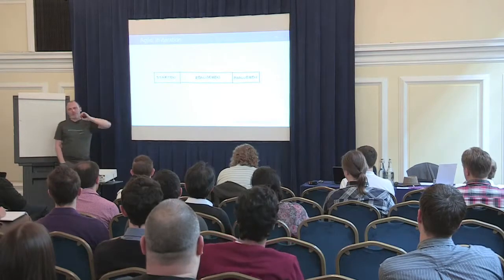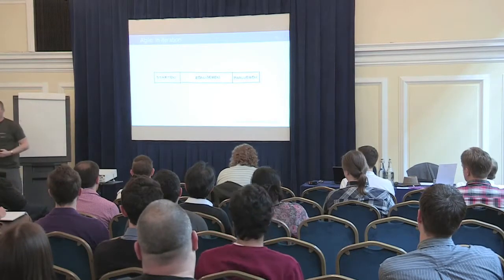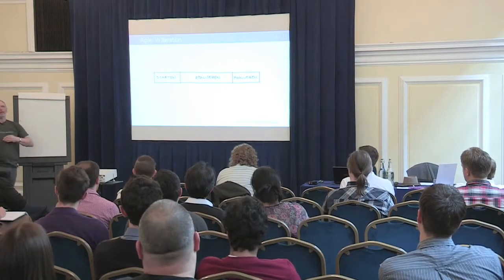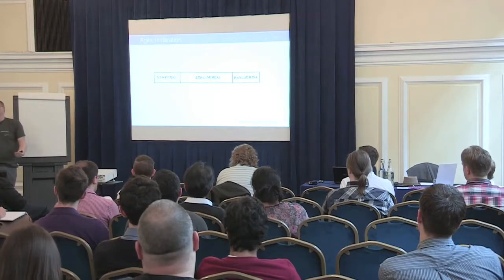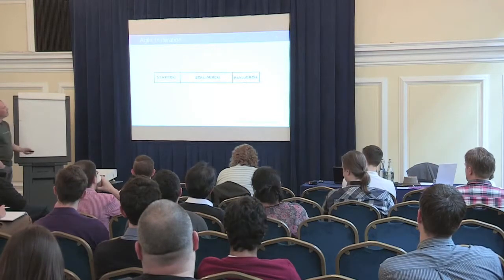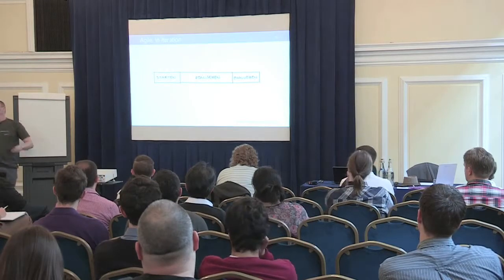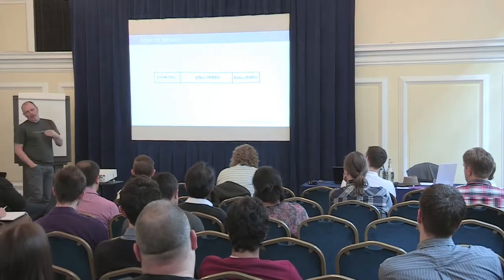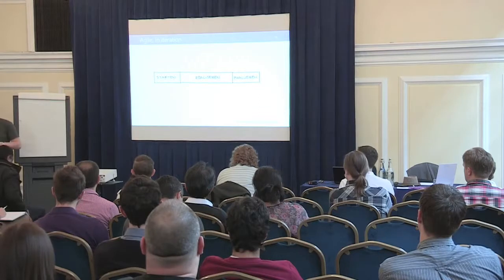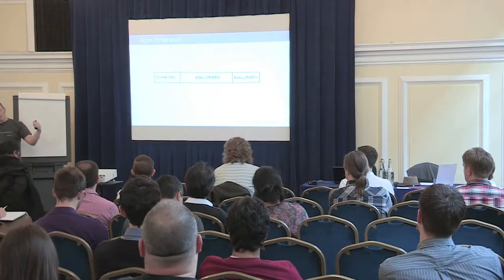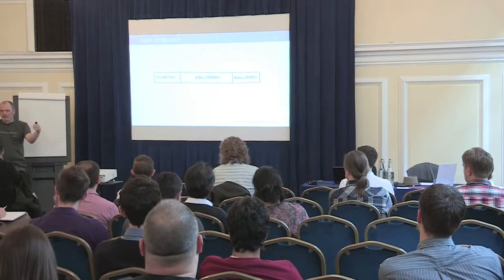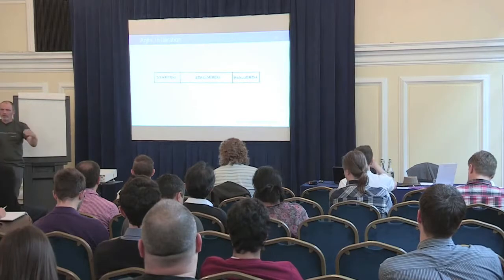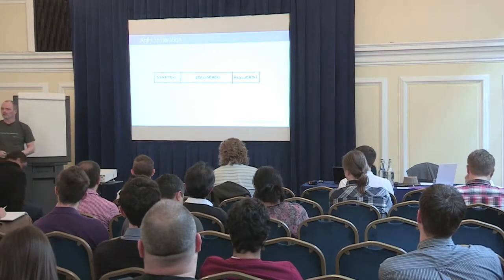So every iteration starts with basically a kickoff, right? And whether you call that the sprint planning meeting or the planning game or just a kickoff, I don't really care about that. What I do care about is trying to figure out what work we will be doing during the next iteration. And I'm, as I said, less rigid about that than most Scrum projects are. I'm just going to say, okay, we know more or less the amount of work that we can do during an iteration, so we're just going to plan more or less that amount of work, and we're going to try cleaning up that amount of work and move on to the next iteration.